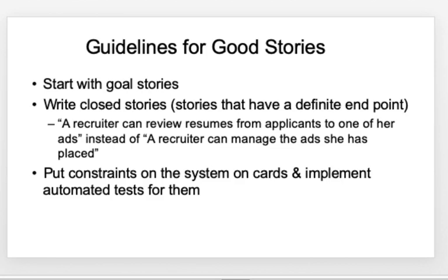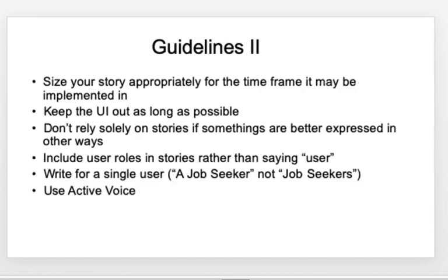So, how to write good user stories? There are certain guidelines. You start with your goal and always write closed stories. You cannot leave it open ended. So, size your story appropriately, because there is a fixed and rigid time frame for the sprint. As long as possible, keep the user interface out and write for a single user, and you need to write it in active voice.